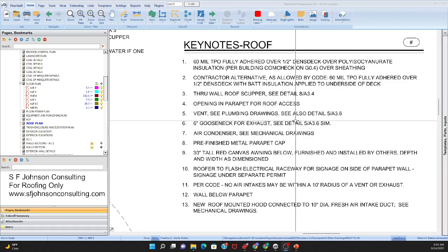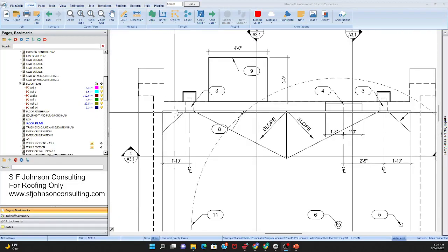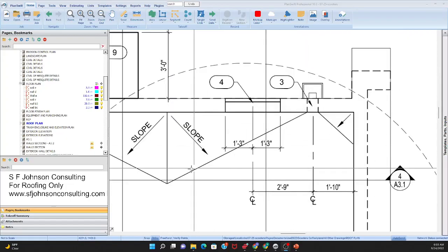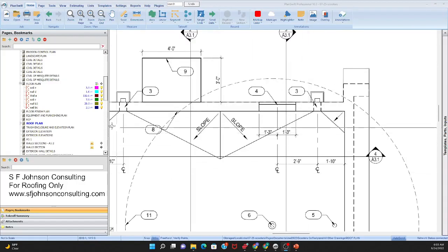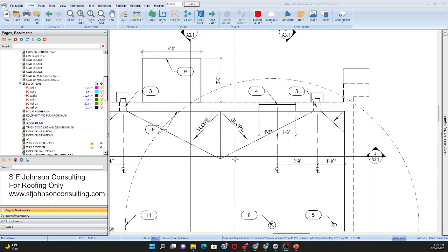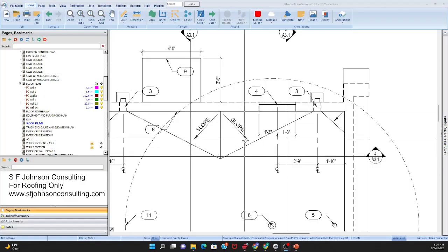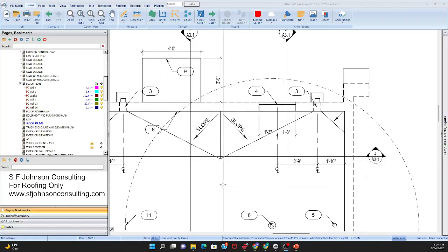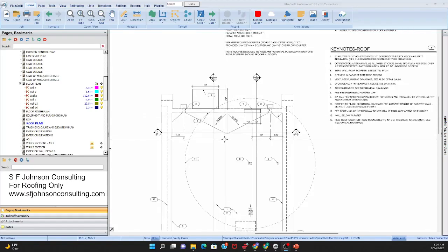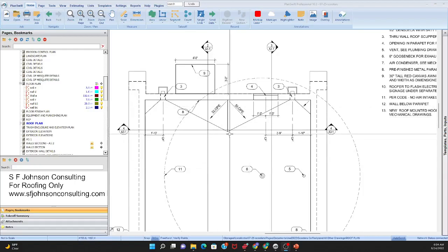Anywhere where wall and roof meet is usually a place to put flashing. So I always give the perimeter of the roof, and then any of the cricket lengths. And what's a cricket? It's just additional framing we place over the main framing to give it a slope so the water doesn't gather here. The arrows indicate the direction the water is going to flow, typically toward the valley.